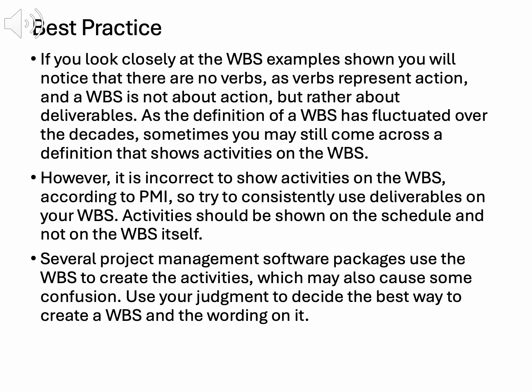Why does this matter? Including activities confuses the WBS with the schedule, complicating planning. A deliverable-focused WBS ensures all work is captured as outcomes, supporting accurate cost and time estimates. For example, the training project's WBS defines course development as a deliverable, with tasks detailed in the schedule.